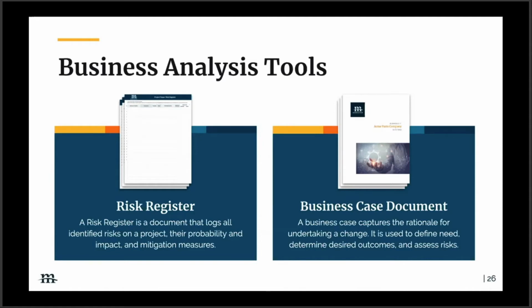Yeah, and it just made me think of something else, Paul, is we've used the risk register to document the opportunity cost as well, which is, all right, say the project doesn't get approved. Well, here's the risk in us not conducting and moving forward on the project. And that's been a great point.